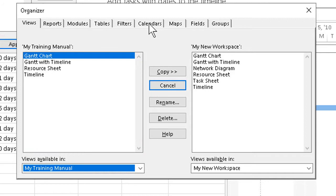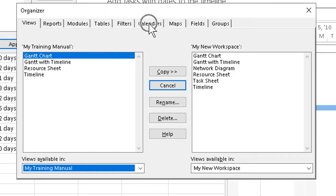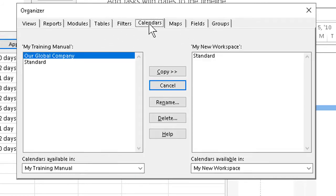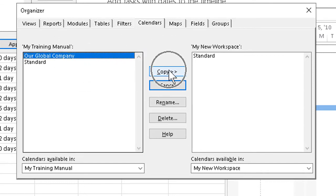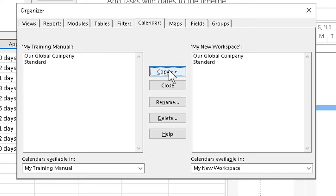Then I have to go up top and click the tab for Calendars. Now I can see the calendar that I want to move, or in this case copy, the one called Our Global Company. I'd make sure it's clicked, go over here to the Copy button and give that a click, and it's done.